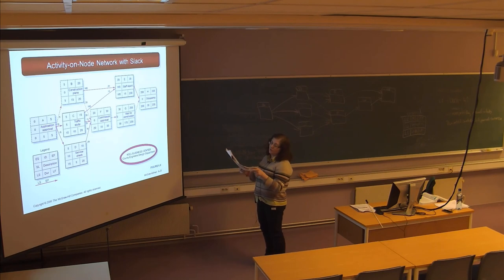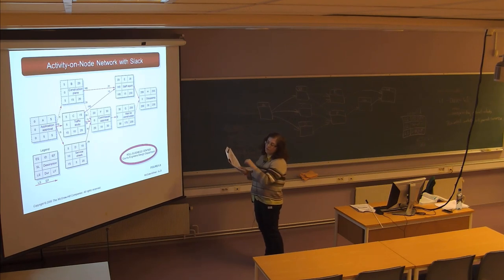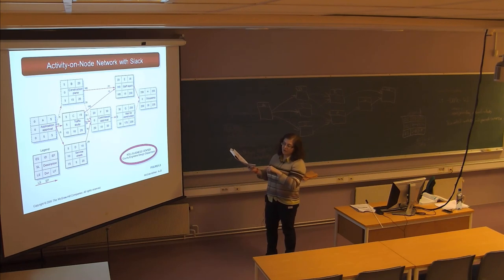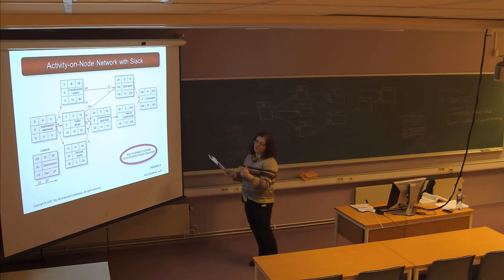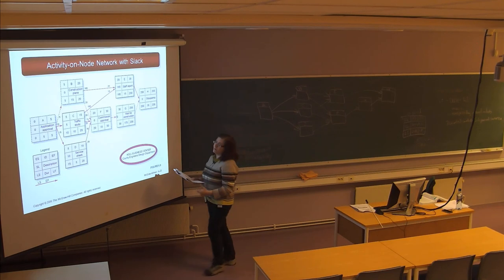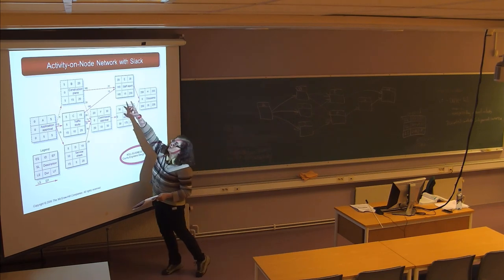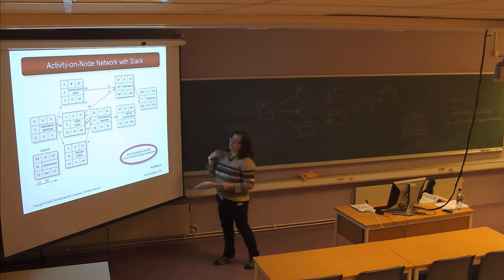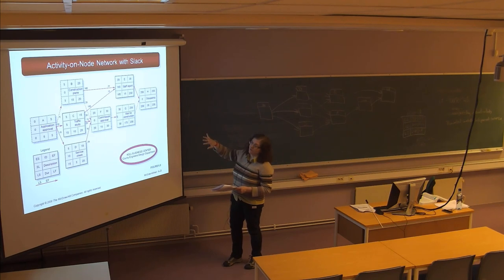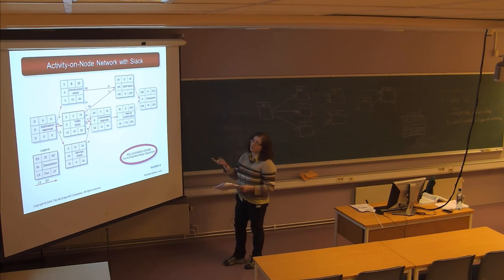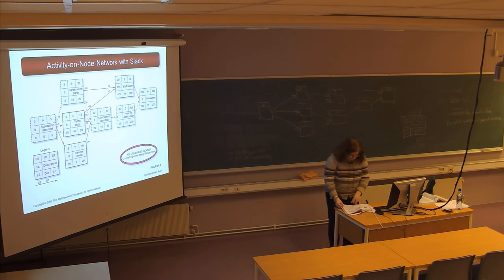If the network had two critical paths — two paths where the slack number is zero — then if you need more time for either of those paths, you need more time for the whole project, making it a sensitive network. Also, if the non-critical paths didn't have much slack time — if that 165 were a smaller number — it would be a more sensitive network. As this example stands, it's a fairly non-sensitive network because it has only one critical path and a large amount of slack in the non-critical path.